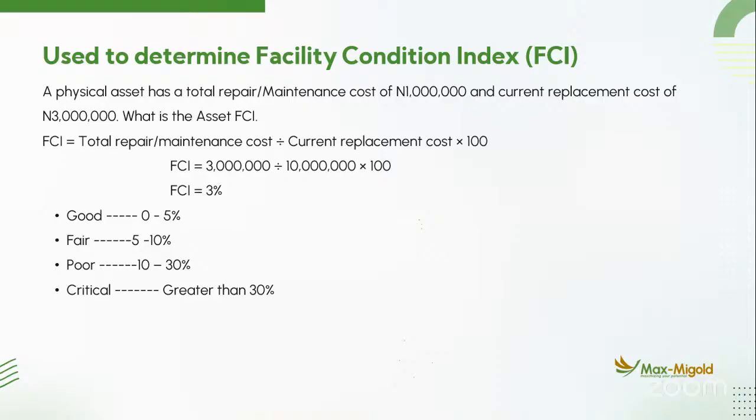Then by the time you do all this costing, you discover that to correct the structural defect of the foundation alone, you might be spending 2 to 3 million naira. Then by the time you sum up all this cost, you discover that it is even of good economic advantage for you to go for an outright demolition of that built structure and rebuild it again.